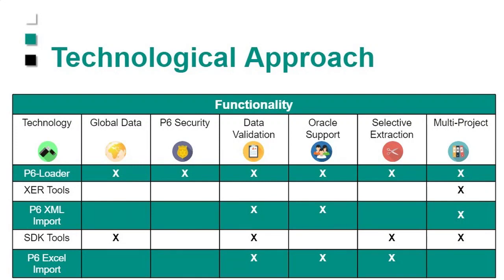And the final thing that Primavera came up with was the P6 XML import export process. Now that's like an improved XCR process. The data is validated, which is a big improvement over the XCRs. It is supported by Oracle, and it does let you do multiple projects. But once again, there's no security. You have to be a super user to be able to do it, and there's no global data available through it. So P6-Loader, because it works through the web services part of P6, does allow you to access global data.